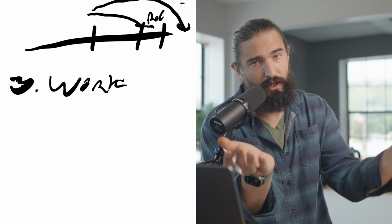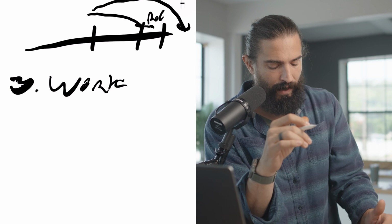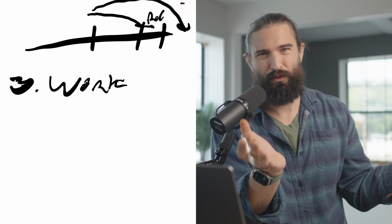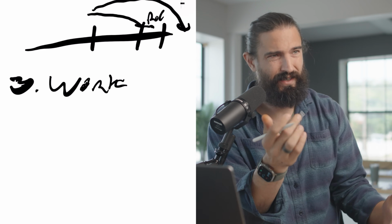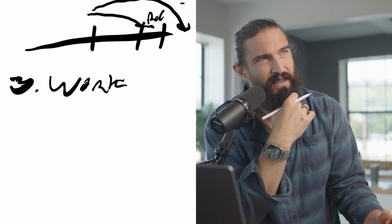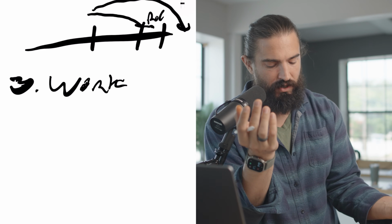And I know that you're going to need to make a profit on this. I'm not saying that you shouldn't. In fact, I want you to make a profit. I'm just trying to make sure that we are seeing the job the same way. Maybe you're thinking I want something that I don't want, right? I'm giving them a chance to reprice here, is basically what I'm doing. And I just break all the things down like that. So it's labor, a few man days, so it's like $1,000, plus the material is going to be like $1,600. Maybe you're thinking that I was going to do something different. And now I've given them the chance to reprice it.